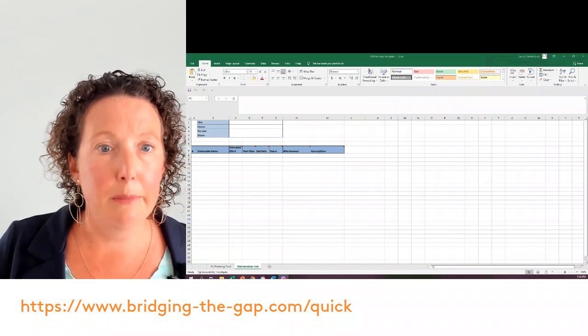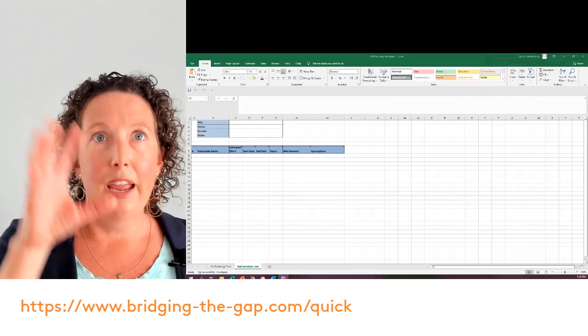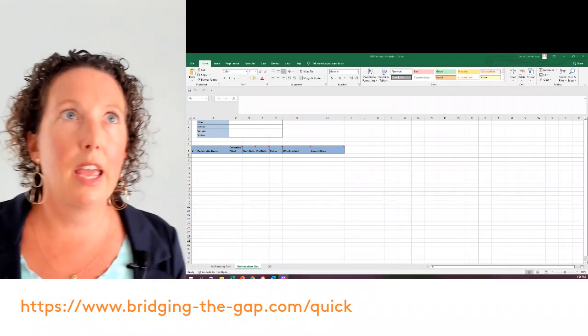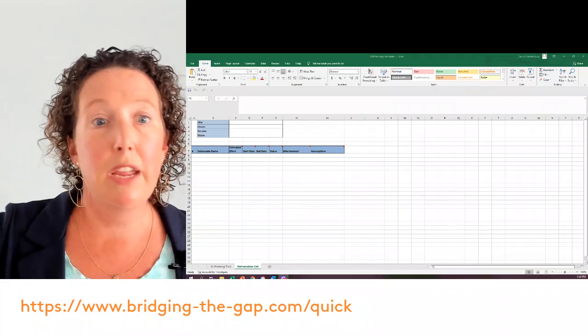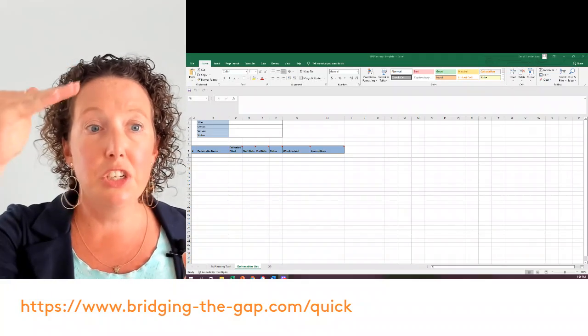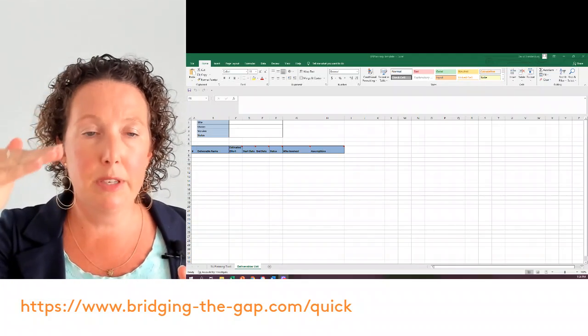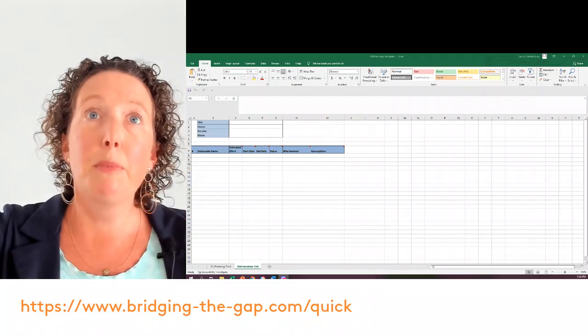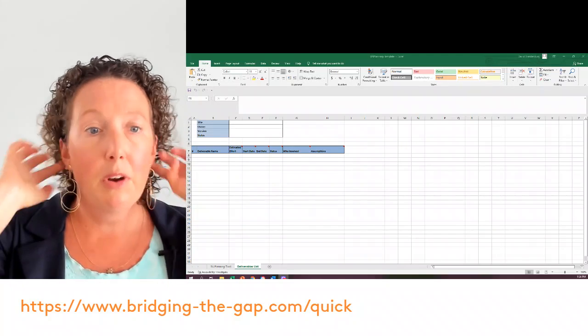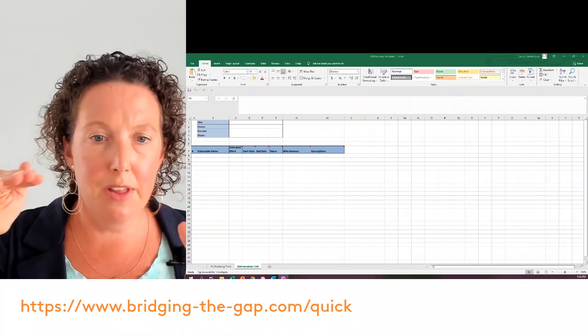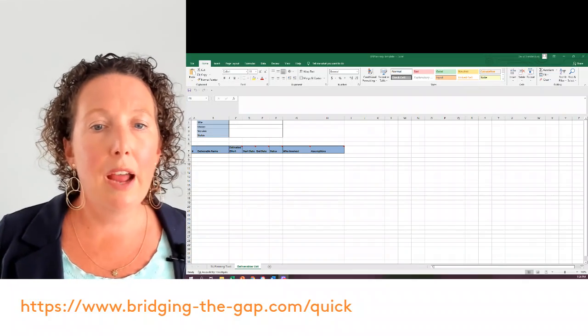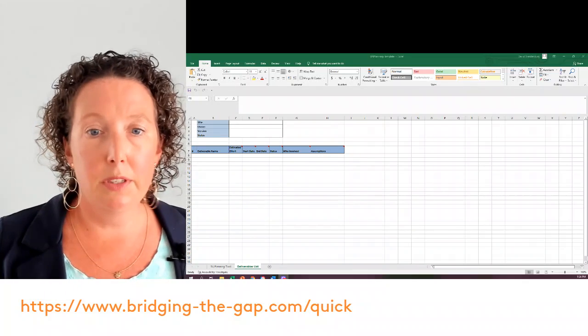So deliverable name. If you said you were going to analyze 3 business processes and write 3 or 5 use cases, you would have each individual use case and each individual business process listed here. Now that information is going to come from that scope statement, right? And the scope statement is also a deliverable, so that could be listed here. So you would have those different deliverables listed out.